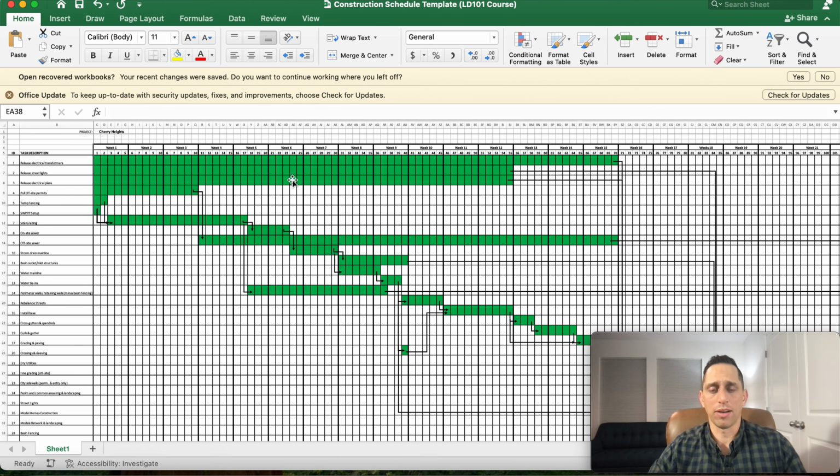Now, one other thing to keep in mind, of why it's so important to understand the sequencing, but also, again, thinking ahead and getting your schedule together, is long lead items. If you can understand where your long lead items are, that'll help you get in front of the schedule so much more efficiently and so much quicker. For instance, your dry utility contractor, there could be long lead items with the electrical transformers. During the pandemic of 2020, it wasn't unheard of that these transformers took 52 weeks to get, which is crazy. Streetlights sometimes might be out for 3 to 6 months or whatever it might be.